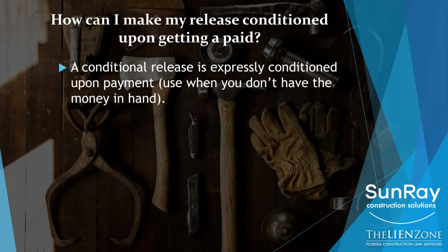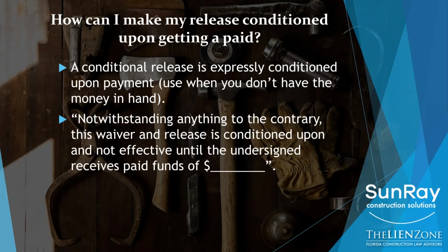So what does this mean? This means that if you are not getting a check at the time you're giving your release, then you need to make sure that your release is conditional. How do you do that? You can add language to make it conditional. So here is sample language that says that.